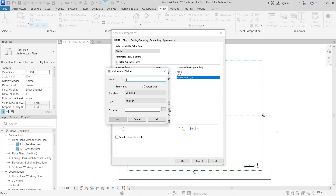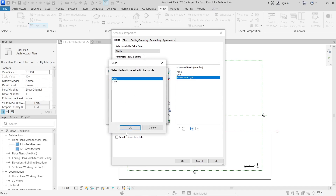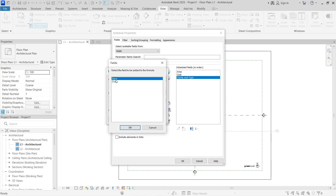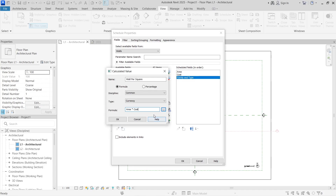We're going to call the calculated field 'Wall Per Square' — or total wall, anything you like. For discipline, leave it on Common, and for the number type choose Currency. The formula is going to be Area times the cost of creating one per square meter. Select Area, press the multiply key (star) on the keyboard, then select Cost. You need to divide this by one so Revit understands what you're doing — if you leave it without dividing by one it gives a random answer, because area is in meters and cost is in dollars, euros, or naira.